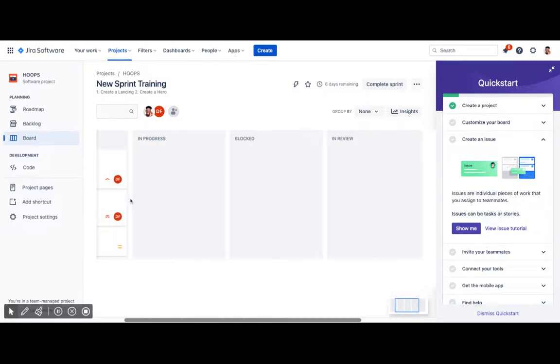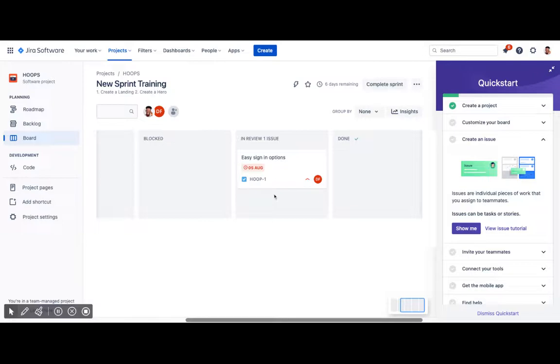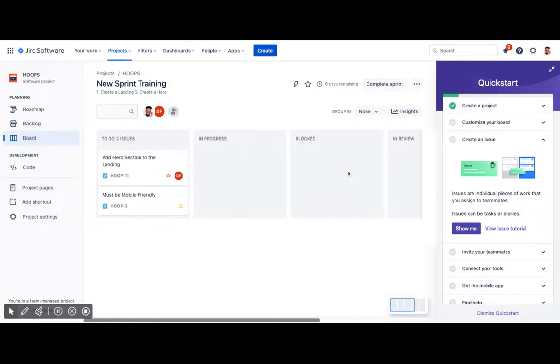Why I like to keep tickets in review before moving to done means they say they've probably done their bit. I just need to validate it, as the product person, to be sure that it works. You have the QA also do review. You can have a different group of persons do review, right? But for the product manager, this allows you to manage what is going to the status done, what can be said to be done, right? And once that ticket has been completed, you've tested it, you've reviewed it, or whoever is QA has reviewed it, they move it to done. This allows you to manage the process.